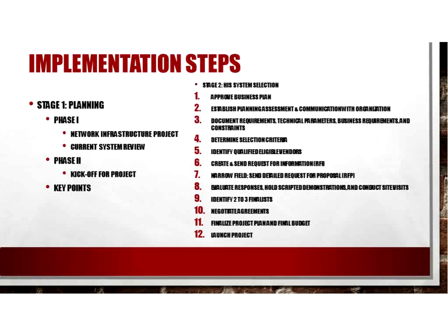Most of the time, it takes years for an organization to implement an HIS strategic plan. A good approach to that will be breaking that big effort into recognizable, executable portions, creating stages, and then each stage contains phases that are further broken down into several strategic initiatives and key steps. So when we look at it in terms of stage 1 with the planning, you can break those down into phases.